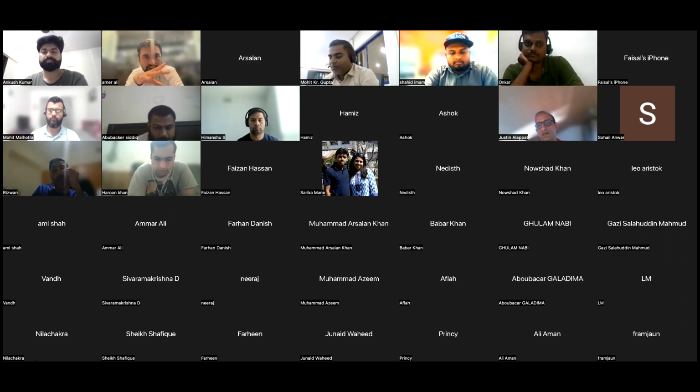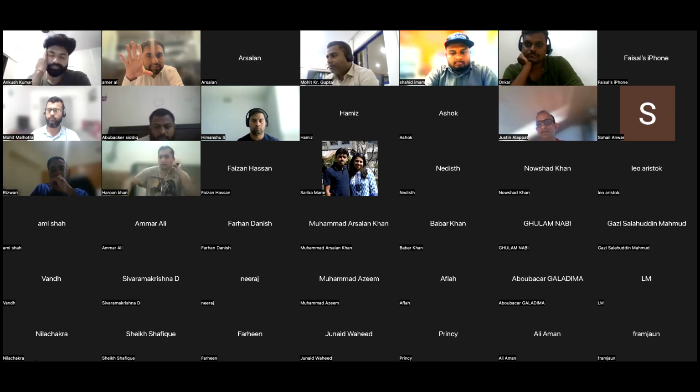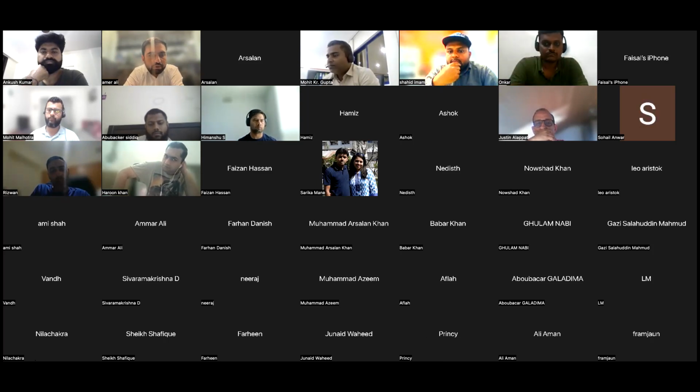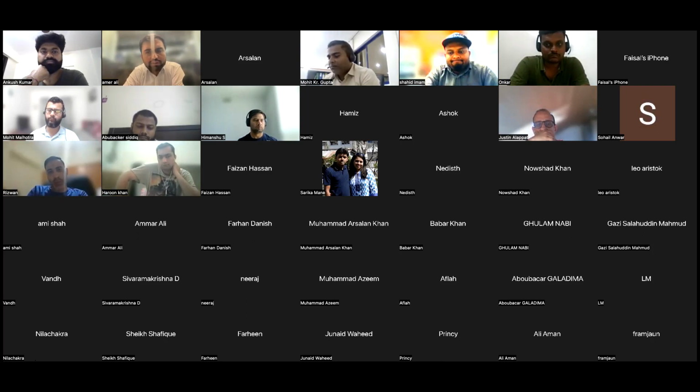So anything that says that, we can easily identify it. So far you are with me? Okay. What happens in closing? You are writing the final report. Project is closed. Team is being released. Lessons learned are updated. Things are being closed now.